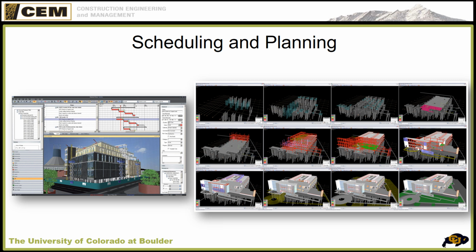He got down to so much detail that as soon as he published it, life changed out in the field and it wasn't accurate anymore. So it's nice to get down to some detail, but once you get past a certain point, the minutia is just too much for a schedule. So there's a balance there, and a scheduler learns that over time.